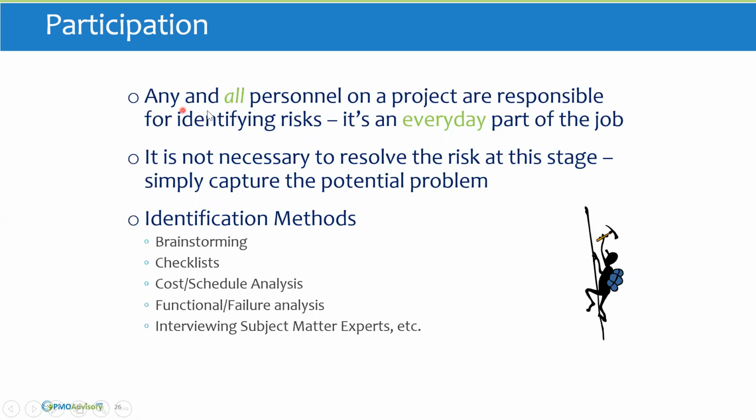So remember that any and all personnel in the project are responsible for identifying risks. It should really be an everyday part of their job. When we identify risks, it's not necessary to resolve them at that risk identification point. We simply want to capture the potential problem.